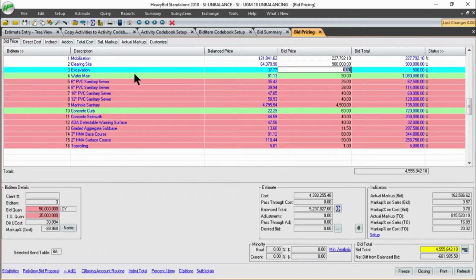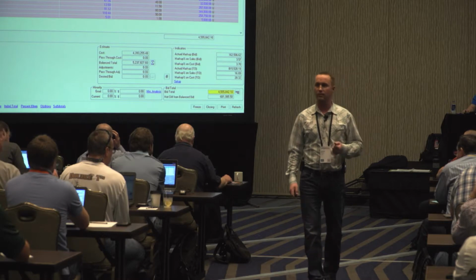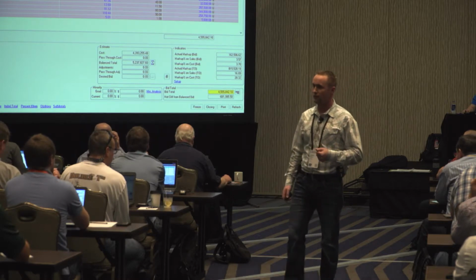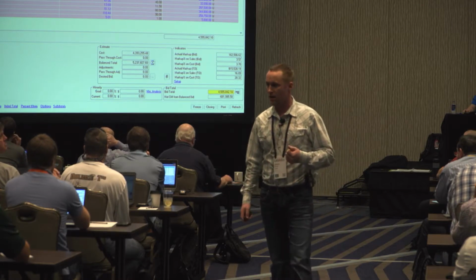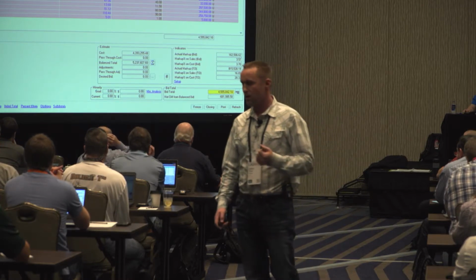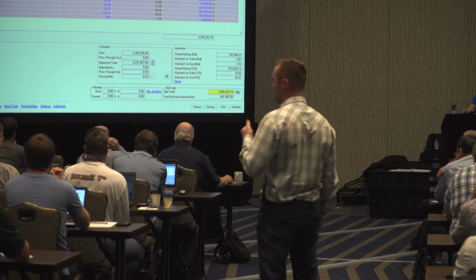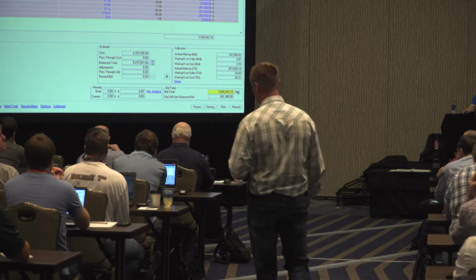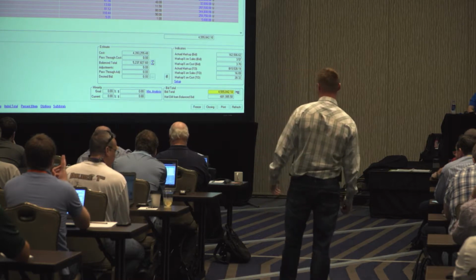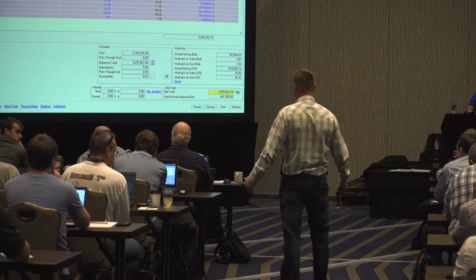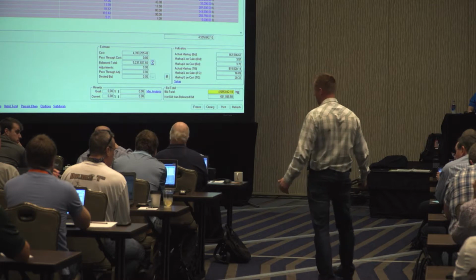And then, when we look at that unbalancing sheet, our summary sort number 3 has a risk value attached to it. So a lot of times, if we don't have the overall confidence that we're overly accurate on that, we'll assign that a high-level risk. So we'll sort by the high-level risk, and we'll see if there's any high-level risk items that we determine are severely unbalanced, and then we'll evaluate, hey, how much are we really gambling here? Like, could this go up to 40,000?